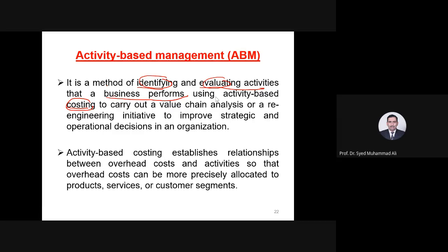That is the most expensive. So Hassan does not need to pay attention to the traveling or maybe to the other jobs which are part of the surveying. He can just focus on that because 60% of the cost goes to this portion.